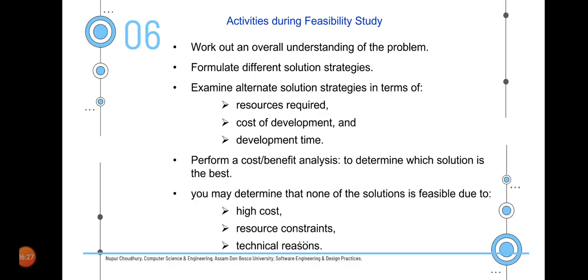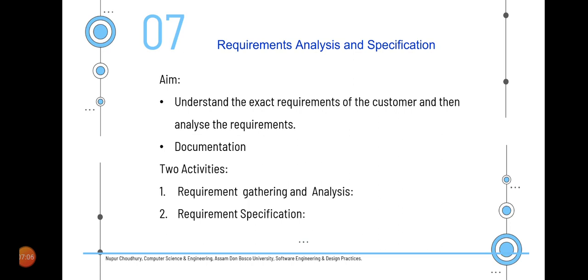If everything goes fine and is acceptable to the officials, the project manager will take a go decision, and the high level solution that has been defined will be used by the developers, and the development will proceed in that particular style. But the answer to the question of why abandoning a project comes where there might be a situation where technical competence is not there with the company, or maybe the timeline by which the company needs it would be difficult to meet, and hence the project manager might have to take a no-go decision or drop the project then and there.